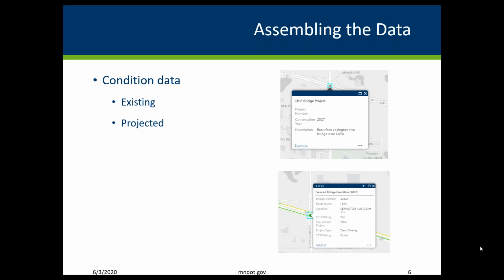So we have two major project plans. One is called the State Transportation Improvement Program, which is the 5-year plan. That is fairly set, but then there's also the Capital Highway Improvement Plan, the CHIP, and that is a 10-year plan. So it's really an iterative process for developing this plan that we want to project projects based on the current pavement conditions, but then the very fact that those projects are scheduled changes the future conditions, so that comes back in a loop to somewhat influence the projects. So it's really this iterative cycle that happens throughout the year, and this process of refinement where eventually we get to a final plan in October.